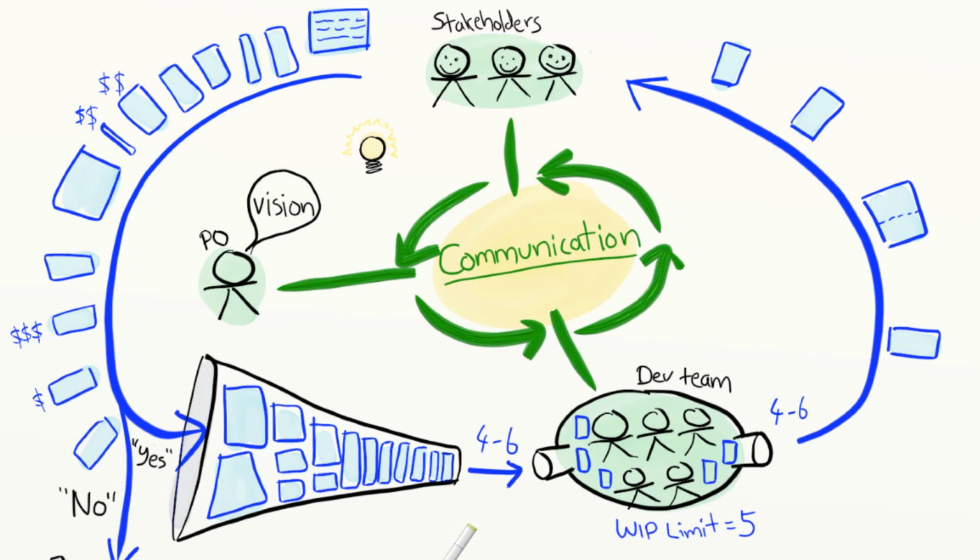In order to deliver early and often, we need to break the stories down into bite-sized pieces, preferably just a few days of work per story. We want this nice funnel shape with small clear stories at the front and more vague stories at the back. By doing this breakdown in a just-in-time fashion, we can take advantage of our latest insights about the product and user needs. All this stuff I've been talking about, estimating the value and size of stories, prioritizing, splitting, all that is usually called backlog grooming.